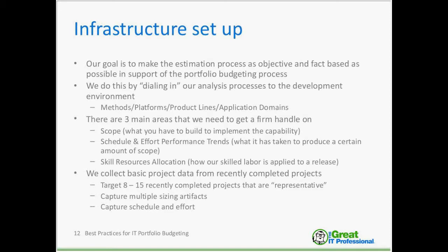This leads us to the main areas where we need to gather some facts. Scope is one of the key inputs to a top-down scope-based estimation process. Next, we need to generate some historical schedule and effort performance trends. And lastly, we need to configure our skill and resource allocation templates.